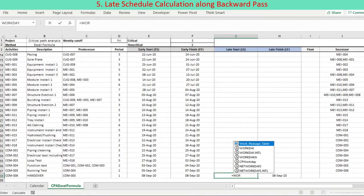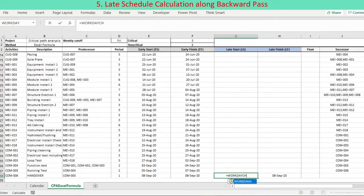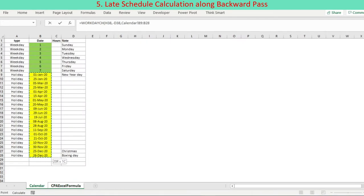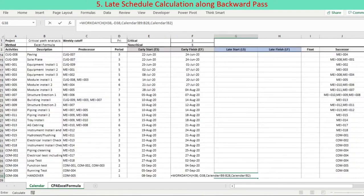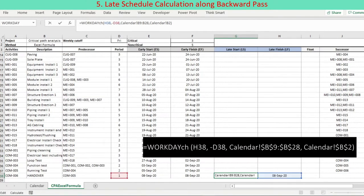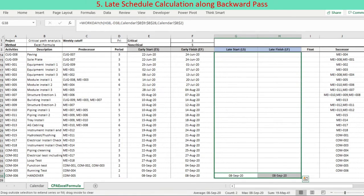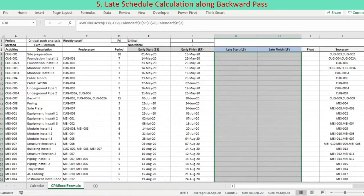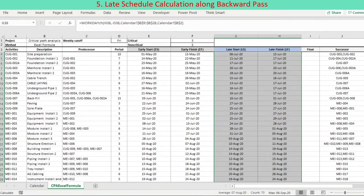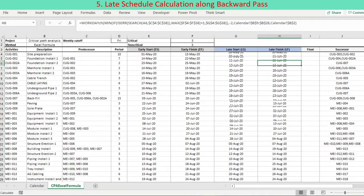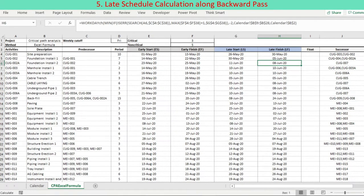Late start date, abbreviated as LS, is calculated with LF, activity period and non-workdays: LS equals LF minus period minus non-workdays, using the modified Excel workday function WorkdayCh. Formulas for LS and LF entered in the last activity cells are copied up to the start activity cells.